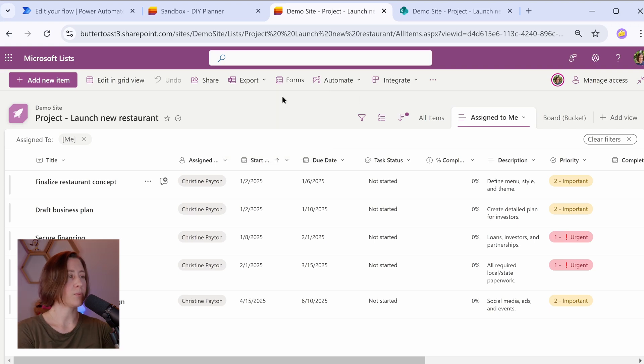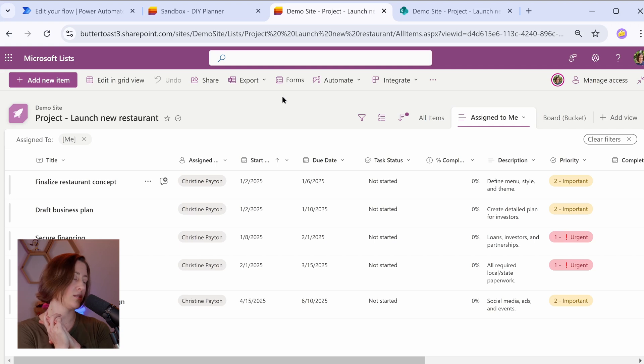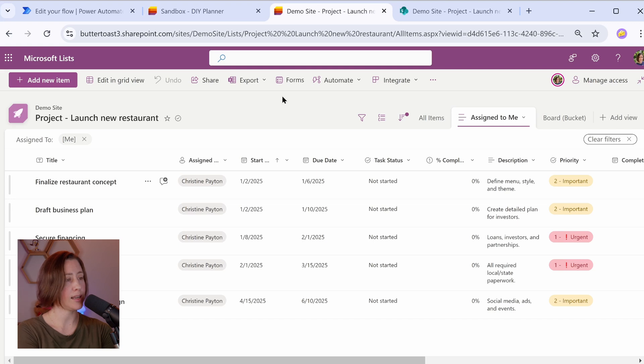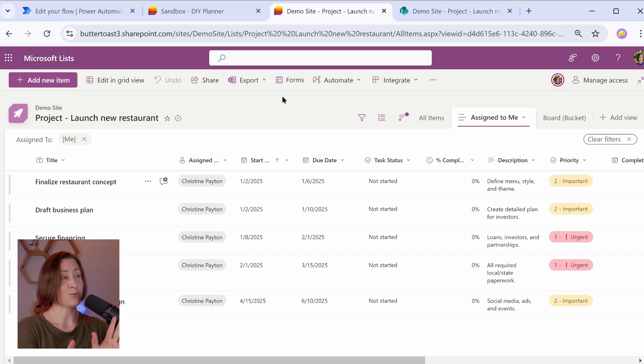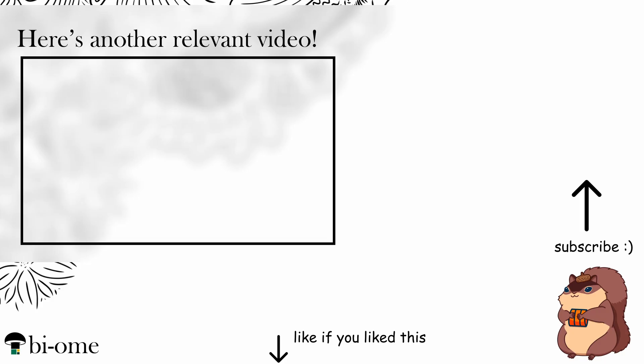So let's talk about next steps. Next steps would be to create any automation on this that you want. So we're going to do a Power Automate flow on this that automatically sets the completed date and the percent complete for things where the status changes to complete. So subscribe if you want to be notified when that comes out. Otherwise, thank you for watching and I hope you have a great day.